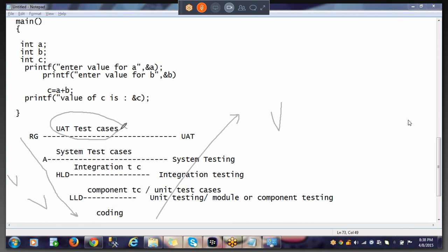So we are doing an activity. Unlike in the waterfall model, testers are not made idle until the development is completed. Here testers are involved right from the initial phase. Why do they need to be involved right from the initial phase? To reduce the cost of fixing defects. And that concept is nothing but early testing. So is this model advantageous over the waterfall model or not? It's more advantageous, but I have a question.